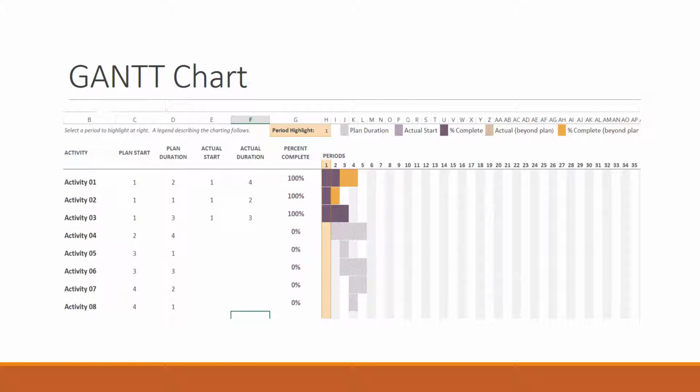As you can see below in the Gantt chart, only the first 3 activities have been completed. The dark purple shows the percent completed, and the yellow gold shows how long the project took to complete beyond what was planned. Activity 1 and 2, obtain list of patients and sample patients, took longer than planned, while activity 3, printing the survey, took the amount of time as expected.